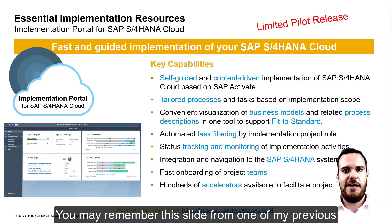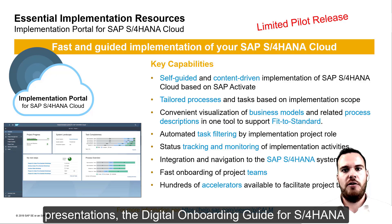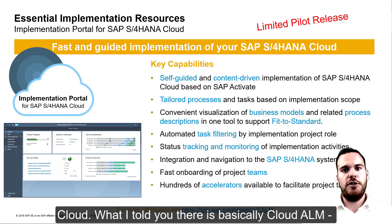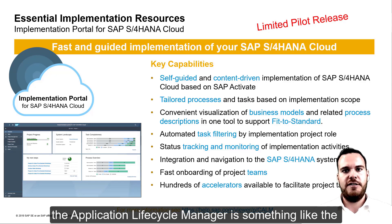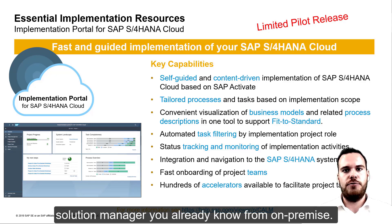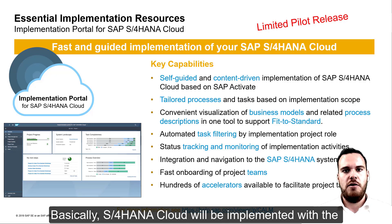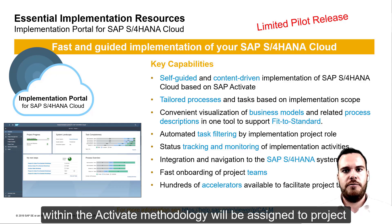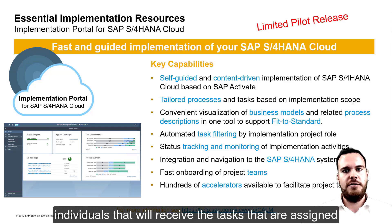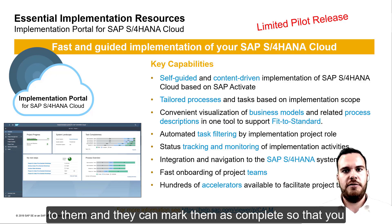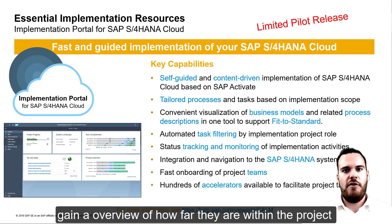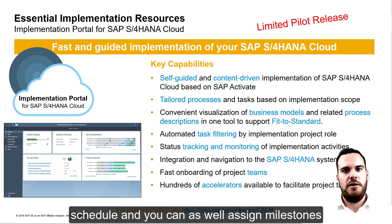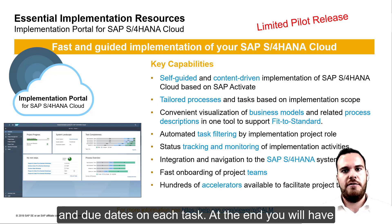You may remember this slide from one of my previous presentations, the Digital Onboarding Guide of S4HANA Cloud. Cloud ALM, the Application Lifecycle Manager, is something like the Solution Manager you already know from on-premise. S4HANA Cloud will be implemented with the Activate methodology. All tasks within the Activate methodology will be assigned to project individuals, who can mark them as complete, giving you an overview of project schedule progress. You can also assign milestones and due dates to each task.